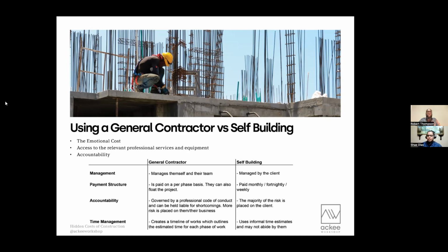So when you send a tender out, to evaluate certain tenders, you'd probably ask a contractor to provide the financials of their business, so you could actually see that they're able to, you don't want a contractor to take your money to go build someone else's job, right? So you need to know how many jobs they have running and how much money they have, so that they could cover your project. But then again, this is when you're dealing with larger projects. A smaller residential project, you might not get that facility, but again, it depends on the size contract you go with.